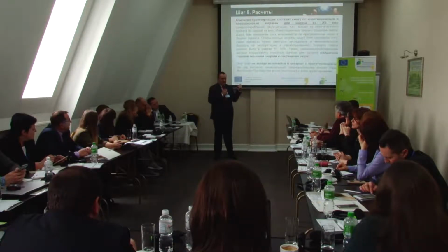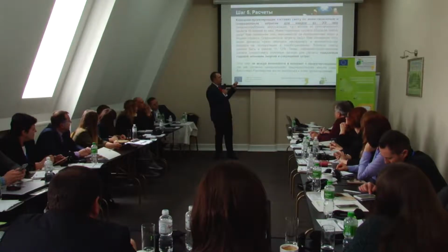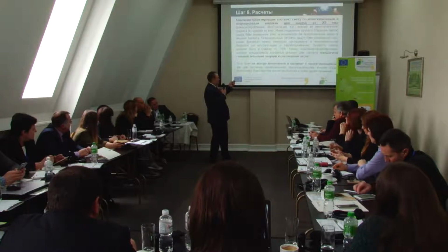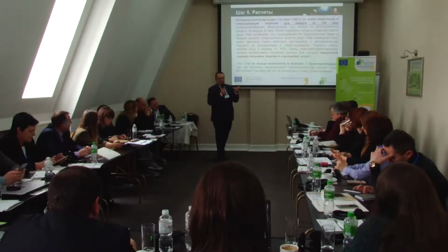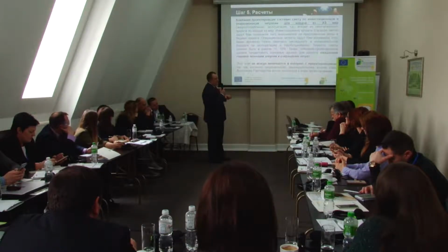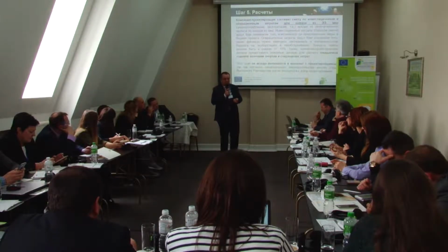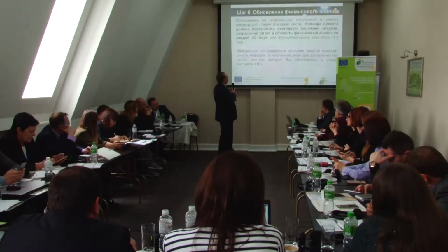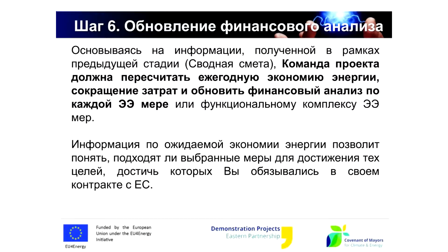For example, the project asks energy auditors to update all the calculations on the basis of more accurate figures and values, like measurements of the area or certain parameters, then the number of lamps, actual capacity, actual boiler house capacity, or any other factor. So the results of savings need to be updated at this stage of the technical design development. That's what you need to achieve.